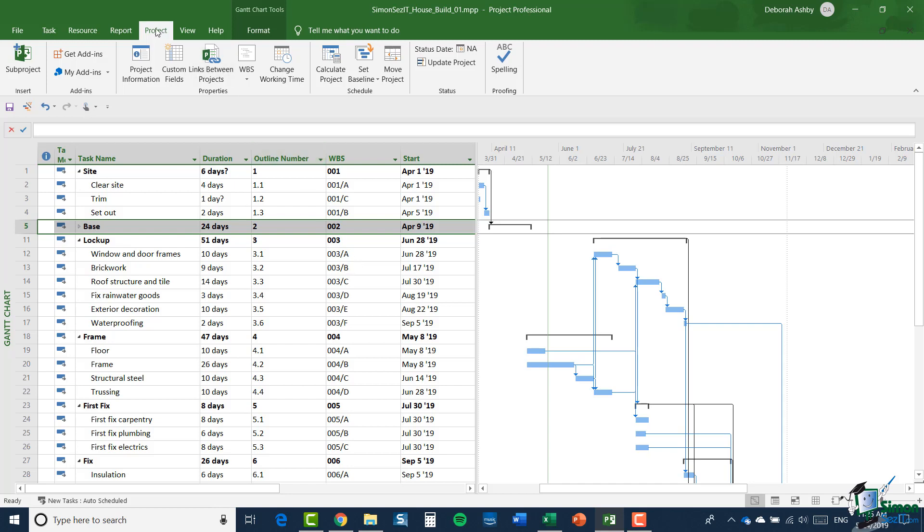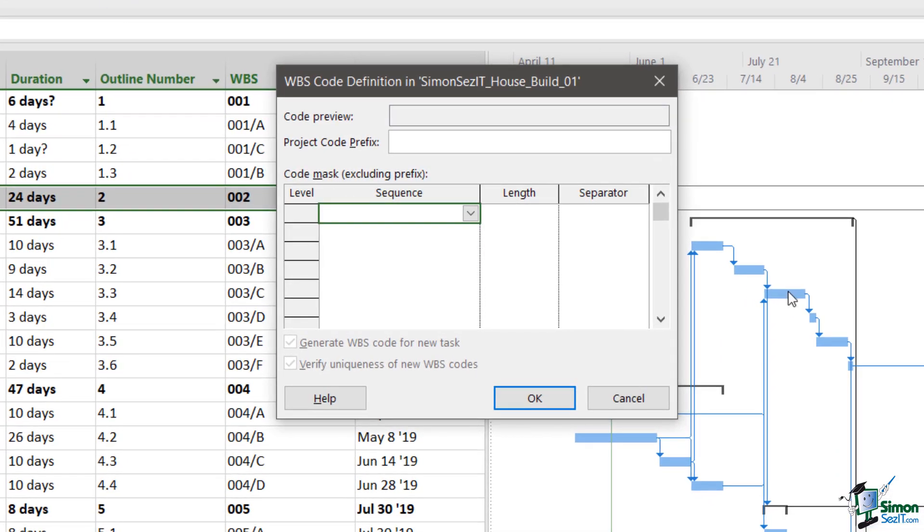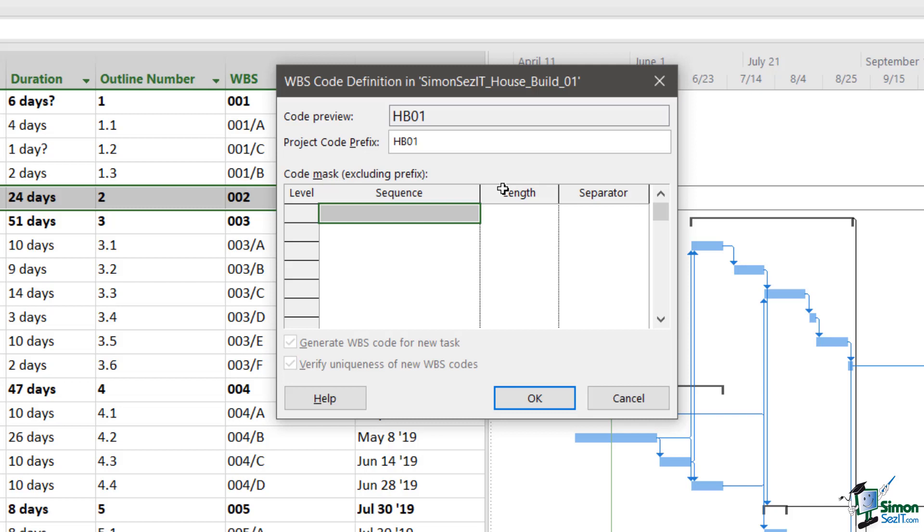Let's jump across to the project tab and then within the properties group, WBS and define code. So that brings up the WBS code definition dialog. Now first of all, we have to choose a project code prefix. Now bear in mind of course what I've just said, you'll normally be given all of this, but let's put our own values in here. So our project code prefix is going to be HB01, perhaps standing for house build 01.